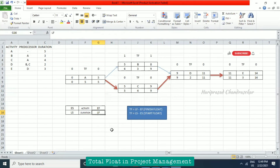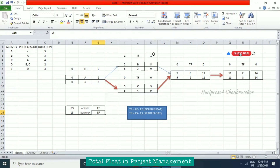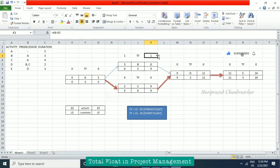Total float is what determines which activities are critical and which are not. If your project shows 220 total float, that means you can delay that activity by 220 days without affecting the project completion date. Total float is also known as slack. If total float is zero, you cannot delay that activity at all. If there is a number, you can delay it by that many days.